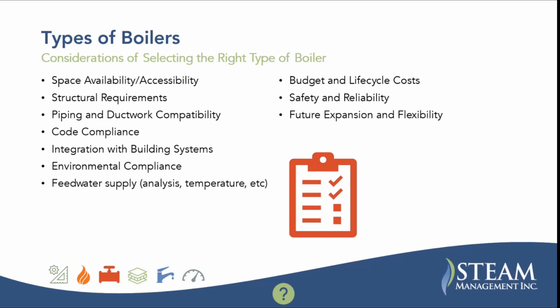and you can access tighter spaces. So that's something to consider: if you have a lot of architectural or structural modifications required to get into the space, that can really kill the return on investment on the project.